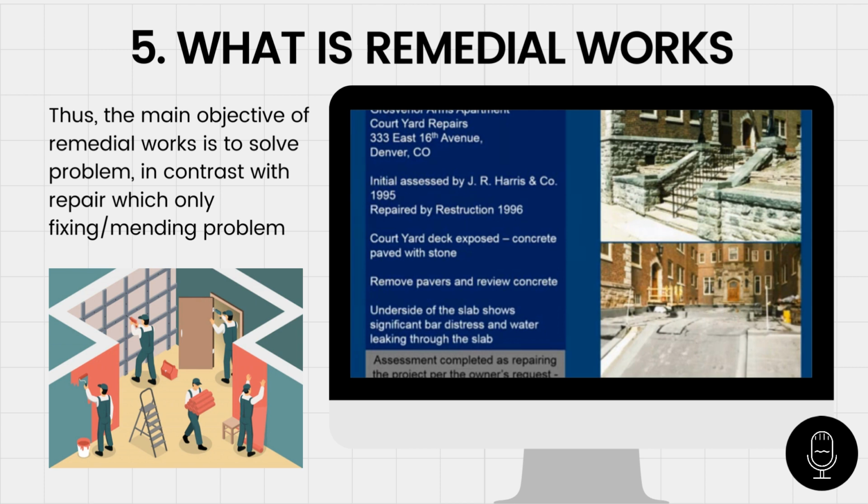This is after the repairs have been completed, but it's the only picture I could find that shows you the real courtyard issues. All of the entrances and exits to the building are in this courtyard. So we're doing repairs of the entire slab area, and yet we have to provide access to the building and emergency exits.